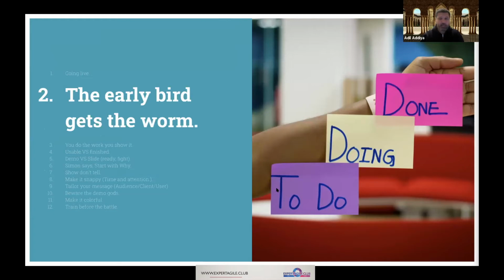The next point is to start preparing the review, the demo, as early as possible. A lot of people I worked with in the past often wait until they are done working, or sometimes they wait until the review is close to start preparing. This creates some form of redundancy, because by then they have already spent days and days working on other stuff, so there's some context switch, there is some lost information, and they work double time. The good thing is to start preparing for the review at the sprint planning. Once you start identifying the work you want to do, you at the same time identify what you want to show and what you do not want to show, and you have a plan for showing that work at that stage.